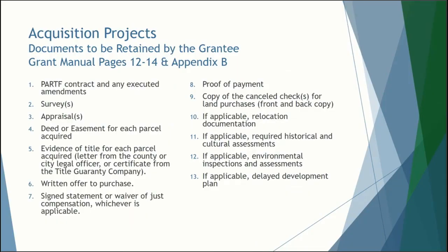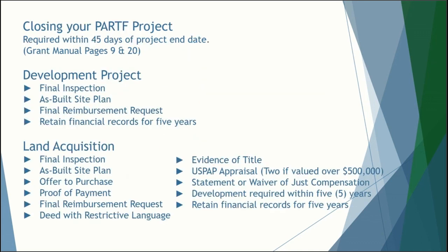This is a little repetitious, but worth mentioning. Please maintain these items in your project file. In order to close your project, closing documentation must be received within 45 days of the project end date. Please reference this list and pages 9 and 20 in the grant manual.